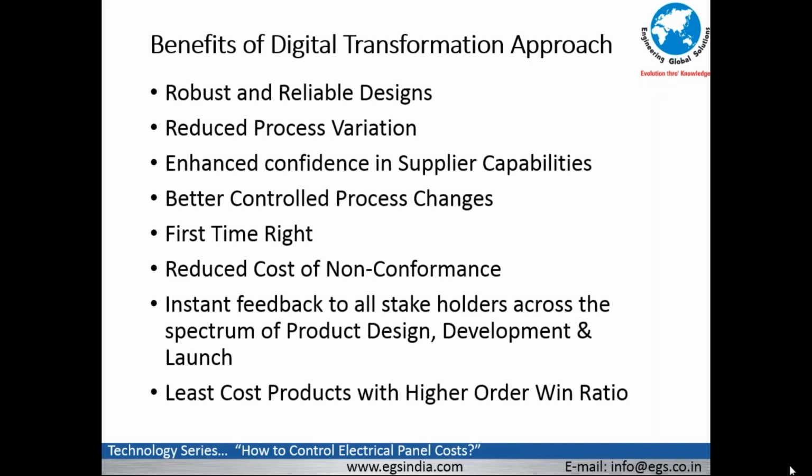A problem solved at the design stage could cost nearly nothing, while if it is at the tooled up stage, it could cost a fortune, maybe 10 times over. And if it is reported at the customer side, then it's a monumental cost.